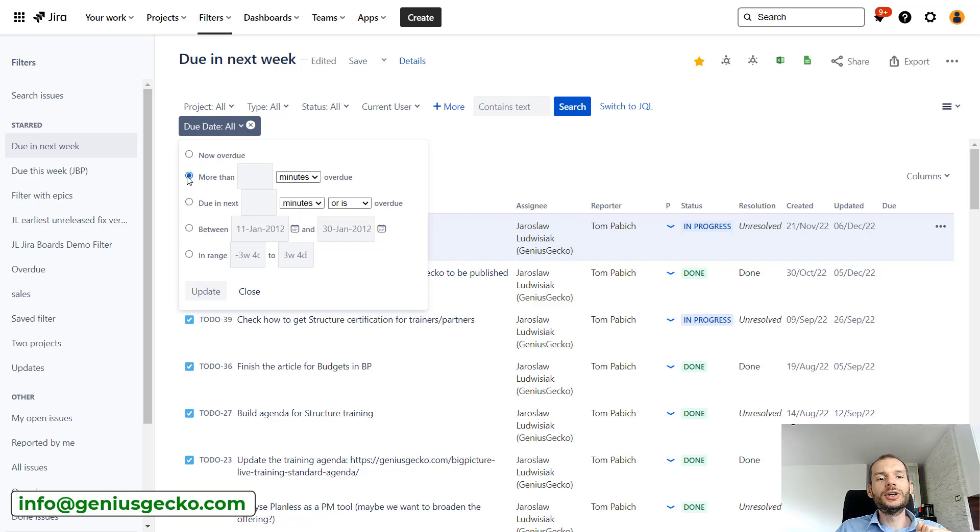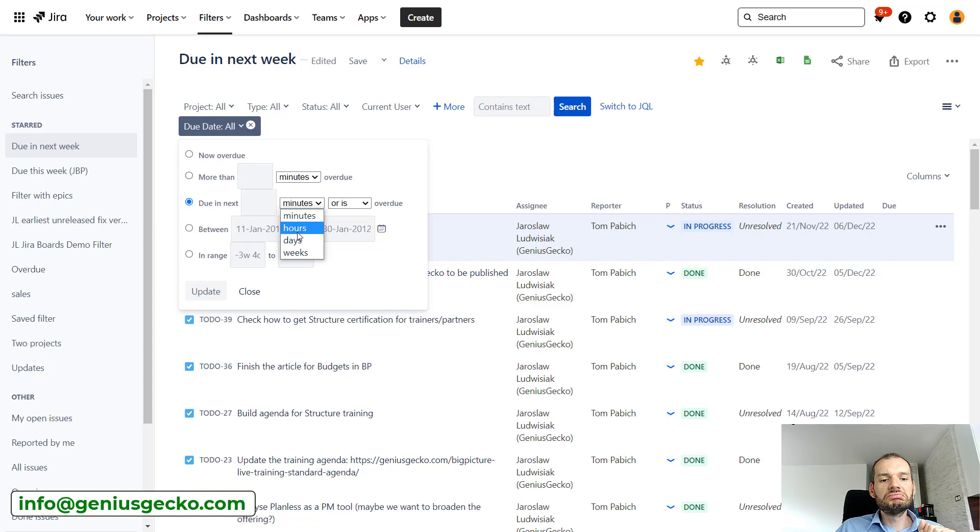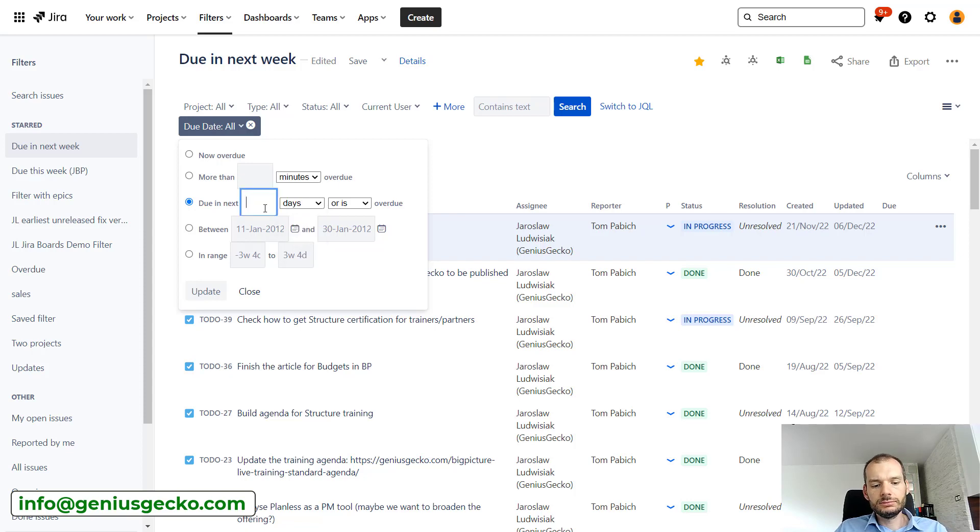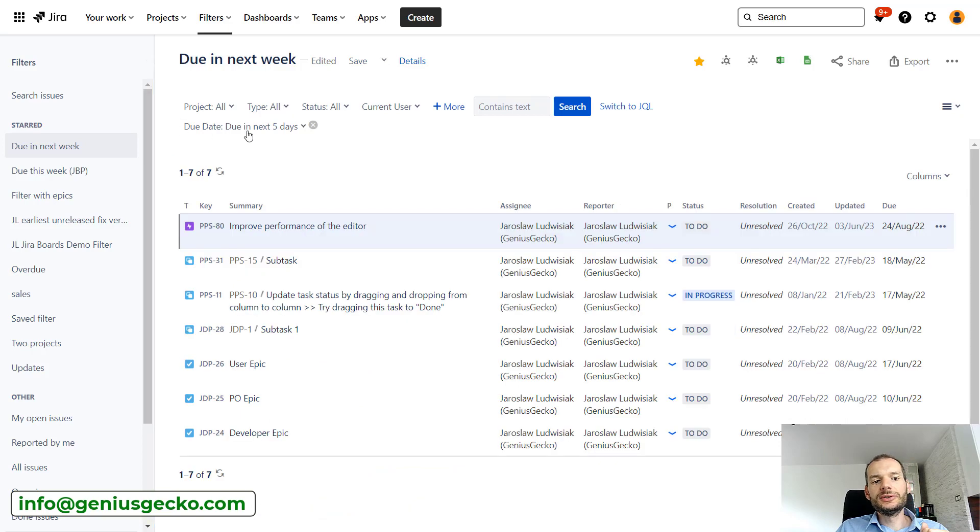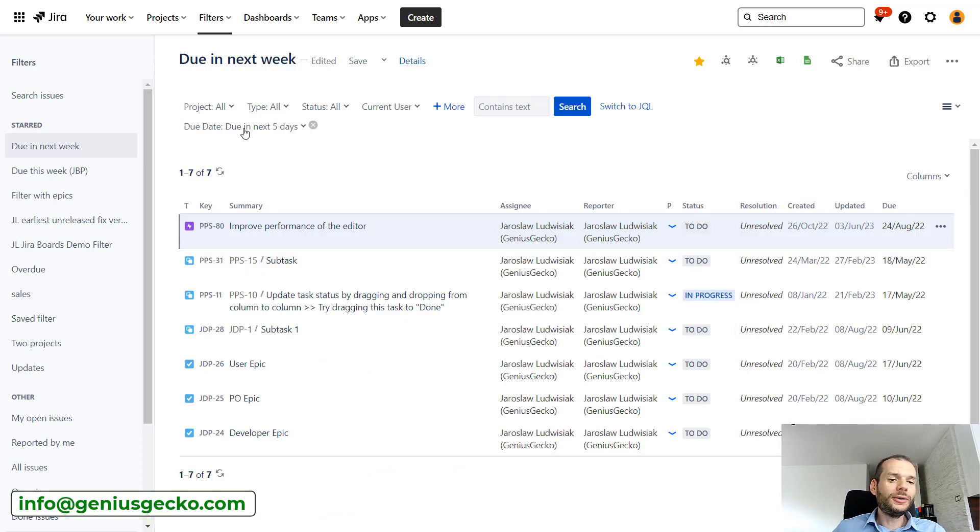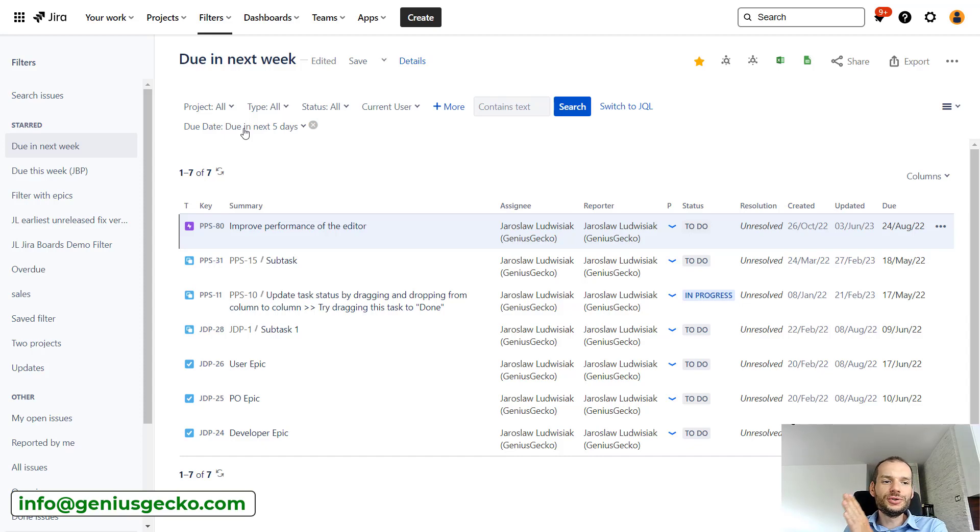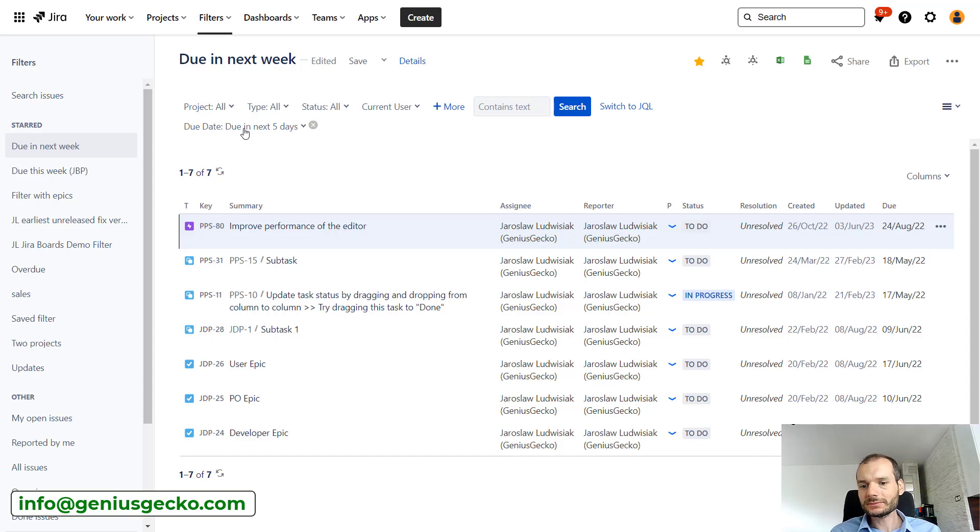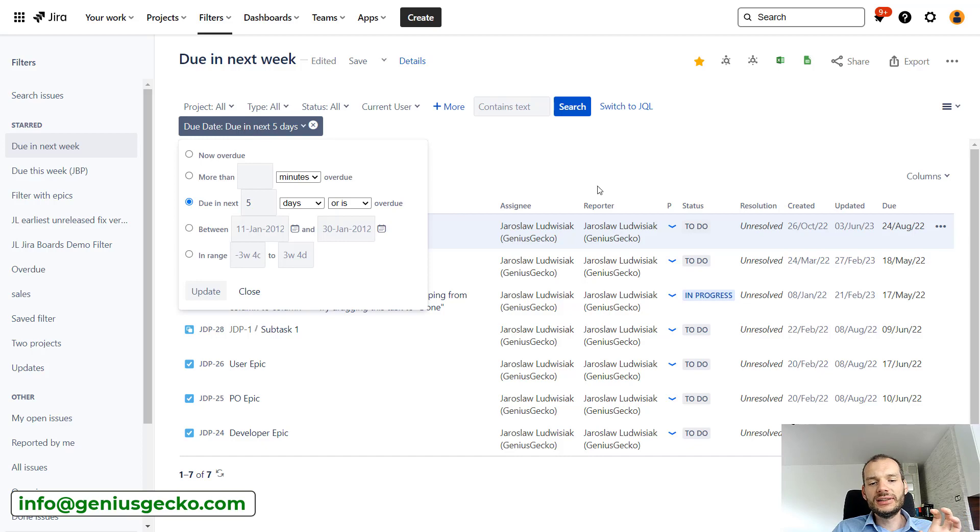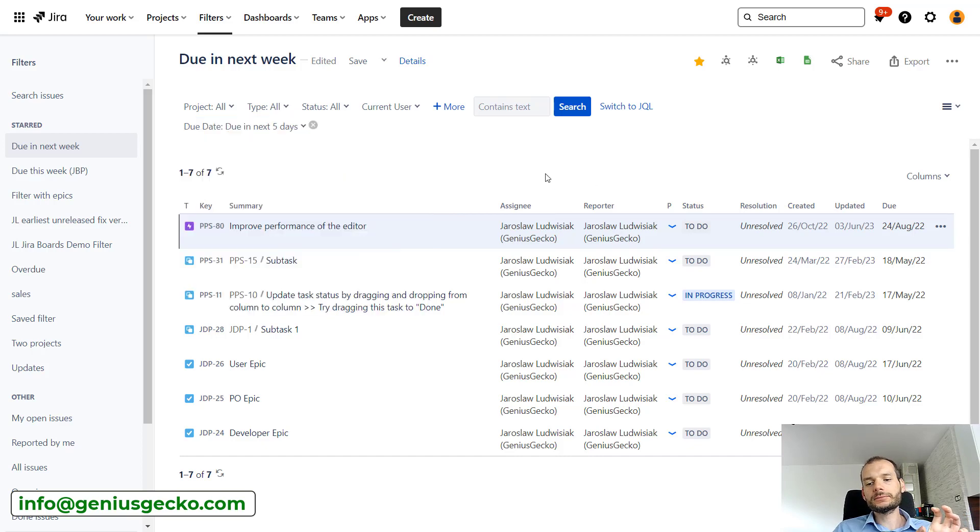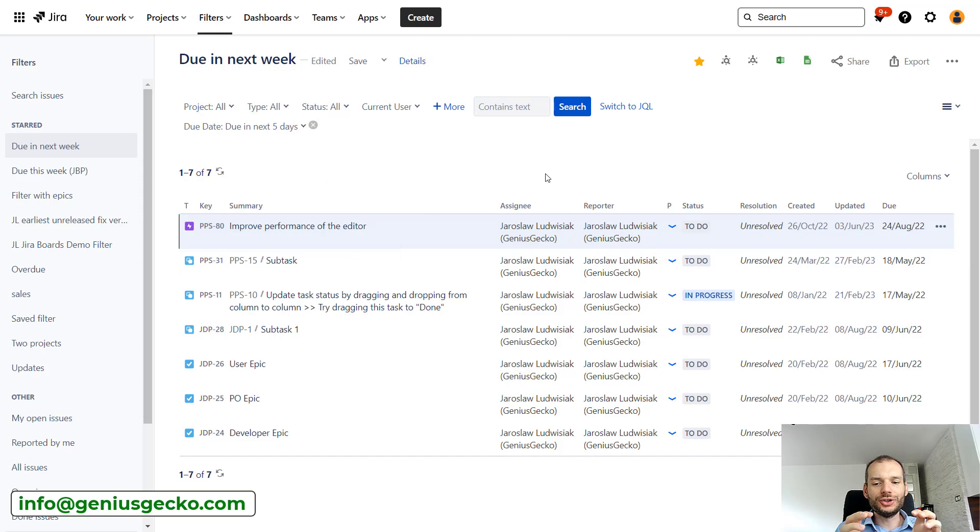So we could say that due date is due in next days, next five days, like that. We will update this and you will see that this is due in next five days. Tomorrow or in the week it will show me the issues due in five days from the moment I'm looking at this. So basically we can use these functions based on the dates and have very updated information on what are the issues that should be prioritized the most at the moment or that are most urgent because their due date is coming close.